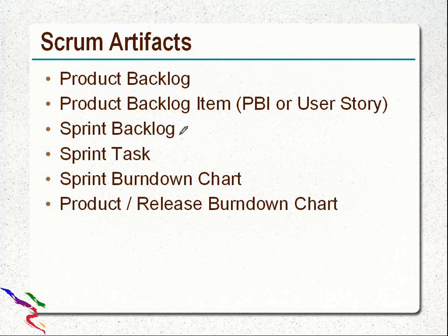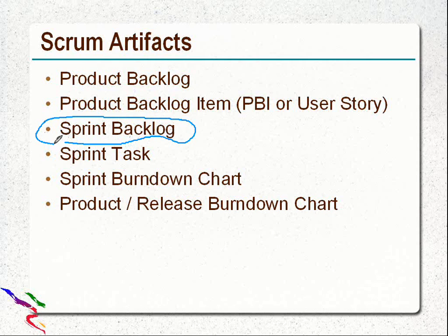Now, Scrum artifacts. We have already seen the product backlog. A product backlog item is the individual item in the product backlog, also known as a user story — this is a single task that can be completed within one sprint. Then there is the sprint backlog, which contains all the user stories for one sprint that is currently going on. Then sprint tasks — the individual user stories should be broken further down into individual tasks by the team.